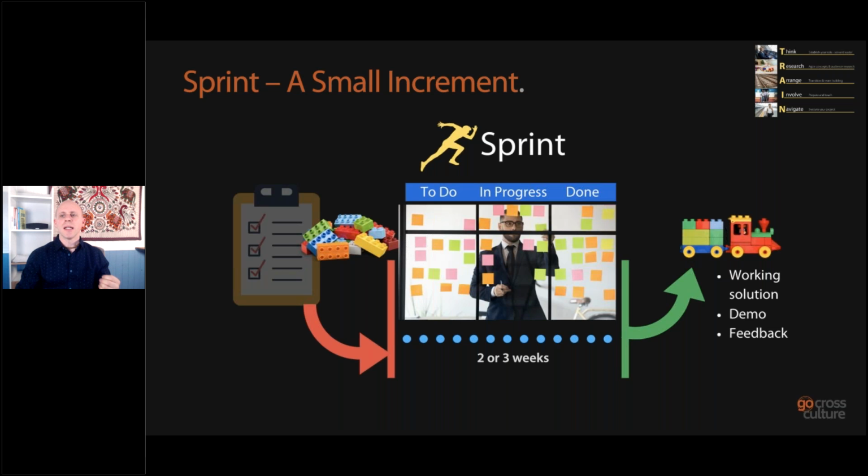So the team, most importantly, is made up of analysts, developers, and testers, and you have a product owner there as well. The product owner is basically your customer, and this is different to the traditional ways of doing things where the business says, here are my requirements, see you in 6 months. This is where your customer or your product owner is involved with you day to day and knows what it is that's being delivered.